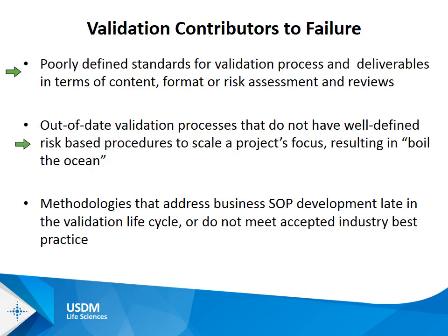So you can run into a boil the ocean scenario, and this we talk about a little later related to the differentiation between UAT and validation testing. These systems, the scope that they have and the extraordinary amount of detail and complexity, if you try to address every possible scenario in the validation itself, you may never finish. So there needs to be a very well-defined process to assess which are the most common scenarios, what are the highest risk scenarios, with compliance and business risk involved. And then limit your validation to those and make sure you do a good job on them, because it should be supplemented by a preceding UAT, which we'll talk about.